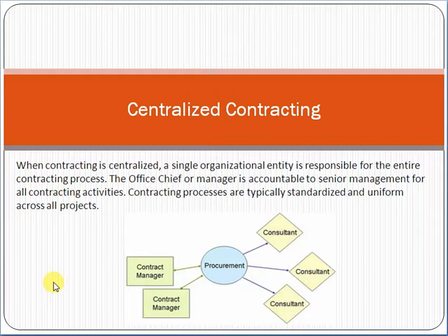Why is it a project, friend? Because it's temporary, it's giving you a unique output, that is the e-commerce solution, and it is not ongoing. Remember one thing: a project can never be an ongoing activity. If it's an ongoing activity, it will be operational work. A project is always a temporary activity which has a beginning and an ending point. Now, if you understand the concept of a project, we can talk about the concept of procurement.